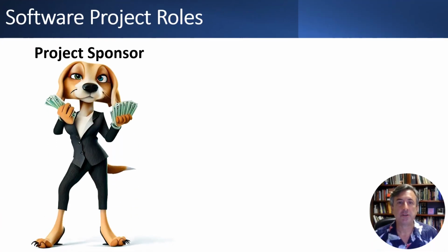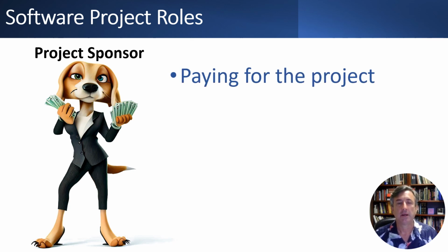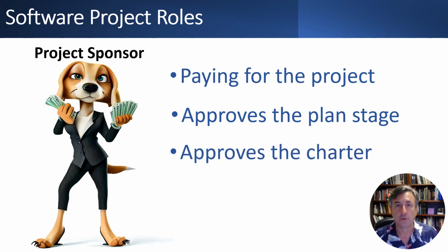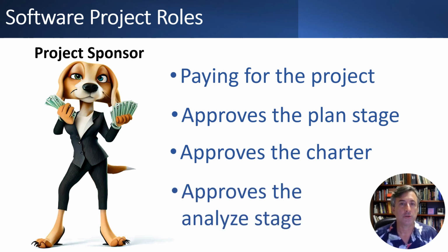Next, we have the project sponsor. Now, they're the one typically paying for the project. They're the ones who are going to approve the effort to plan it, to go into a plan stage. They are going to approve the project charter, and then they are the ones who are going to approve spending additional effort if you recommend moving into analyze stage.